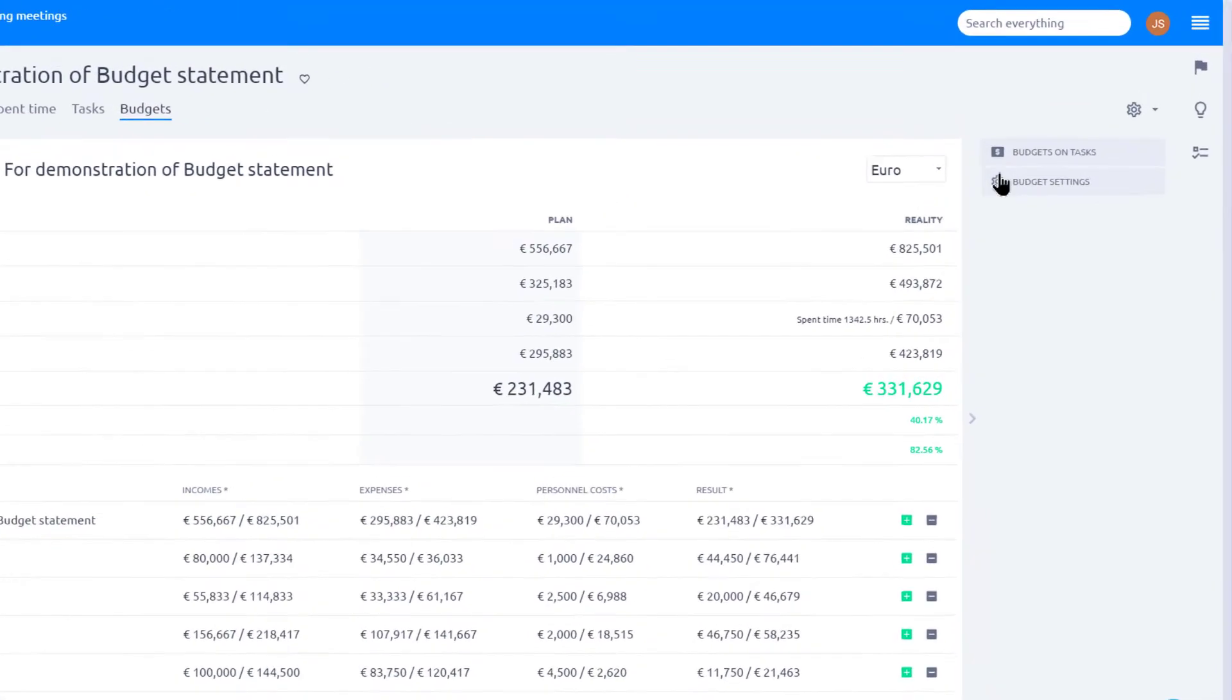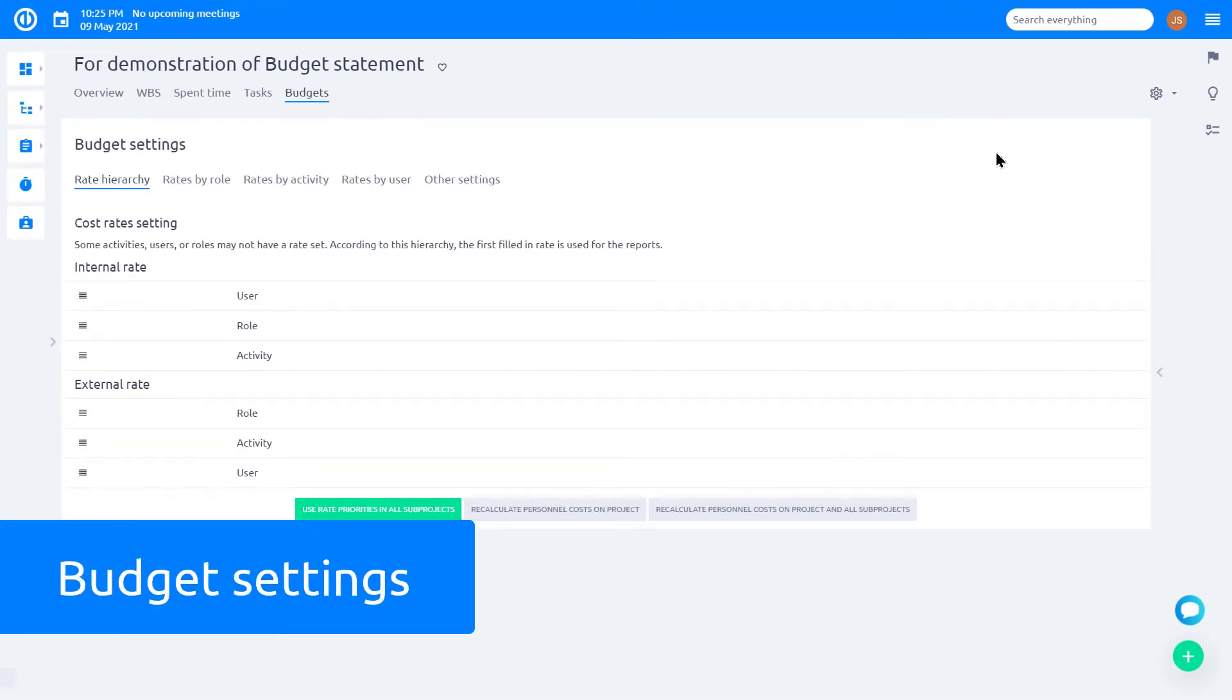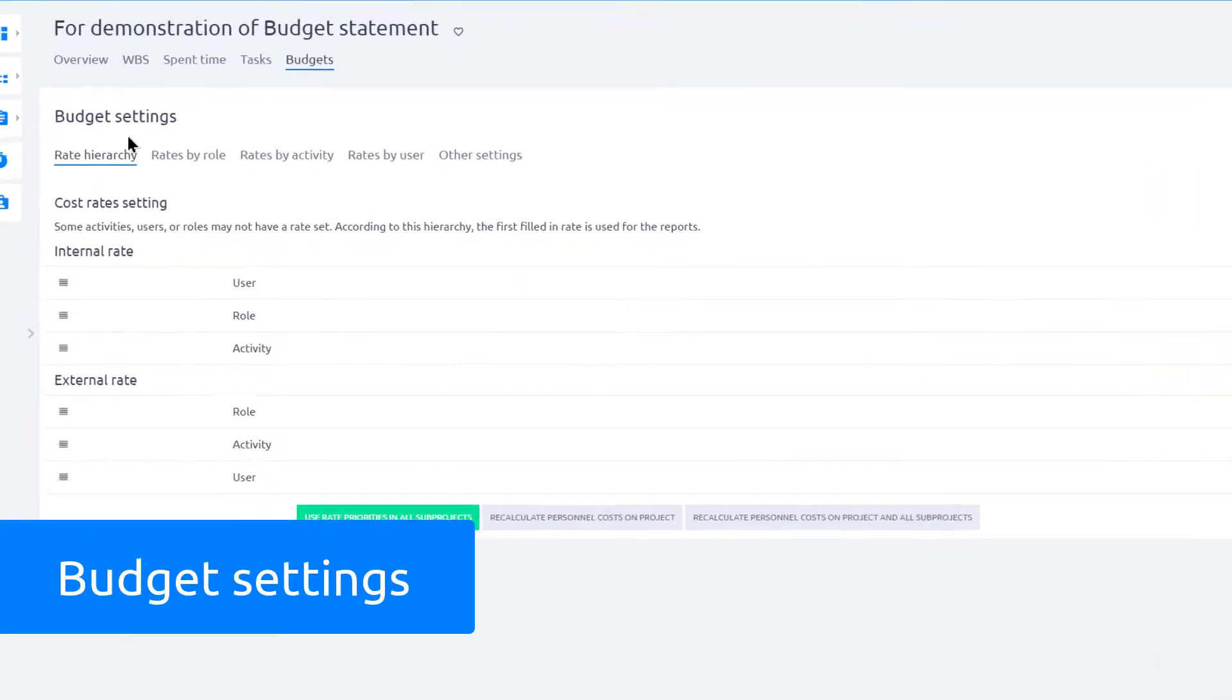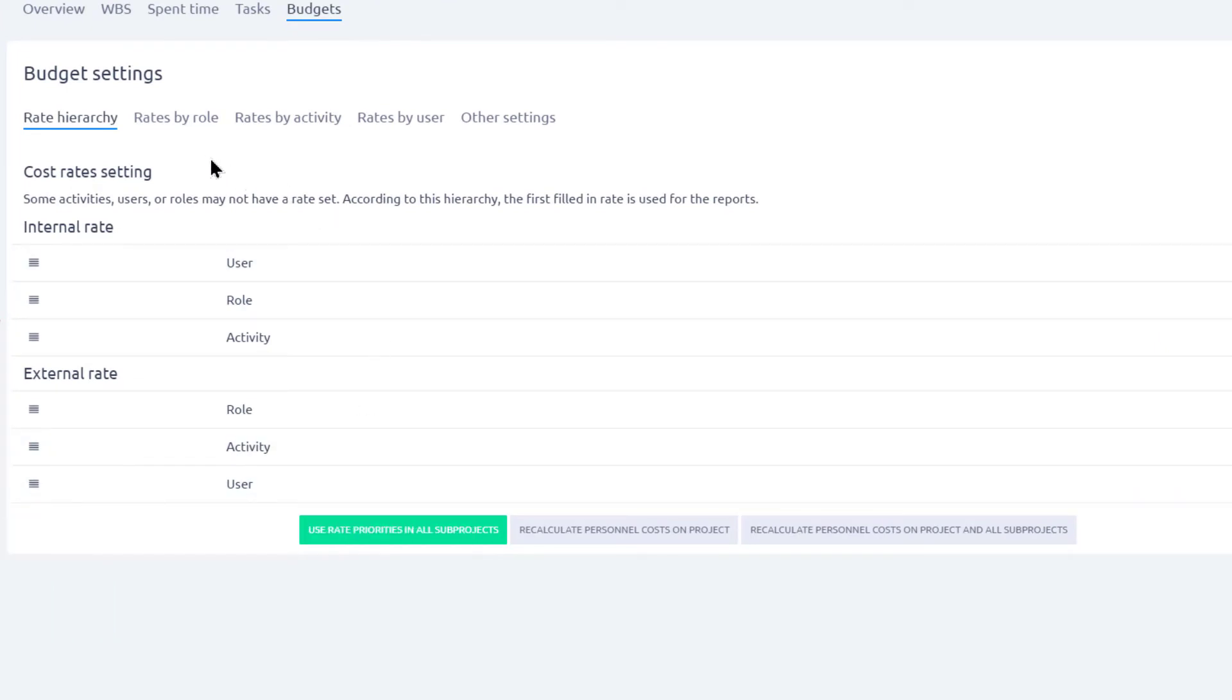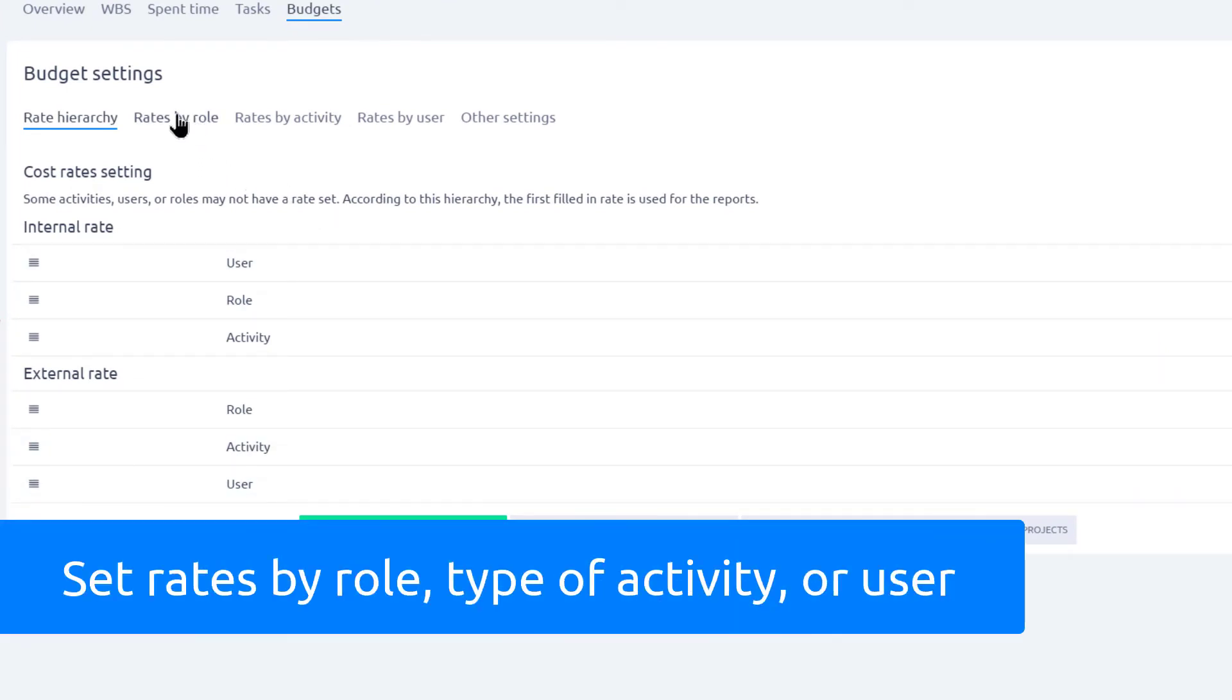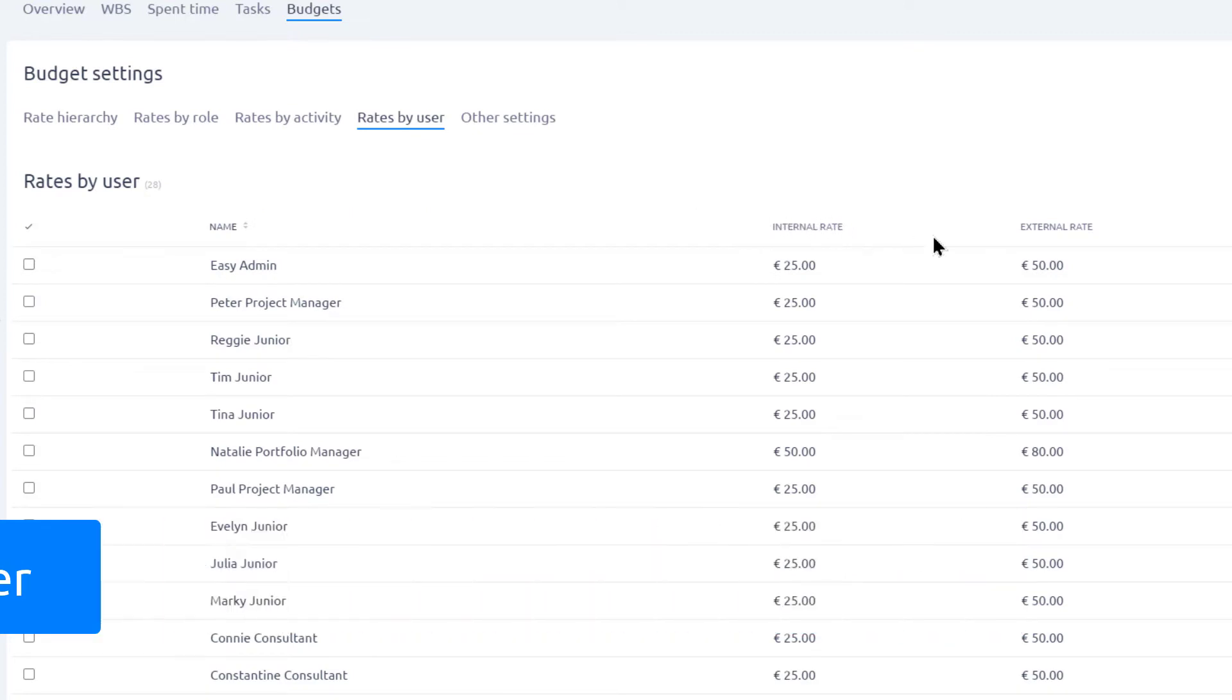Hourly rates can be easily adjusted in budget settings. Here you can see rate hierarchy, and in these three tabs, you can define rates by role, type of activity, and user for both external and internal personal expenses.